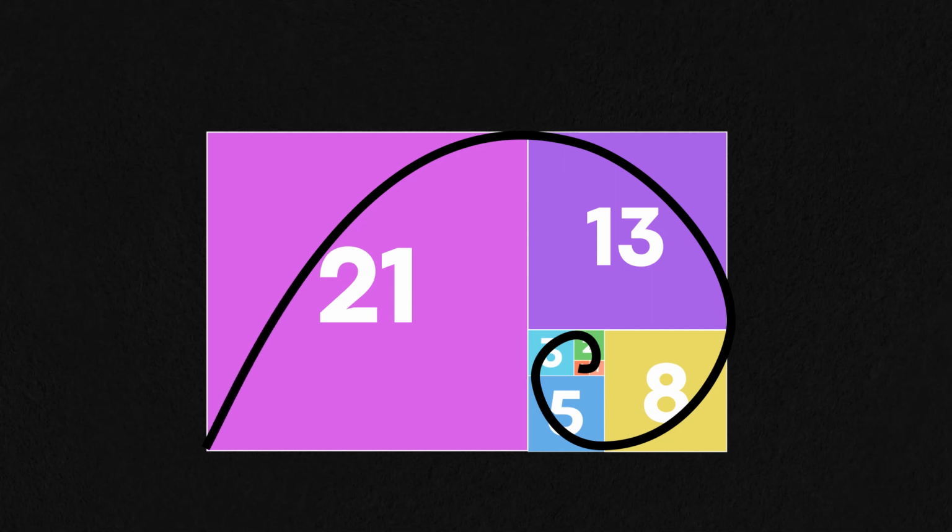And because you're just estimating this based on your past experience and everything, whether it's 3 or 4 is really hard to argue since it's not super tightly evidence-based. But if you can tell the difference between a 5 and an 8, there's enough of a gap there where you can have a little nuanced conversation about it. The general idea of pointing is to note difficulty, where the lower number speaks to its ease.